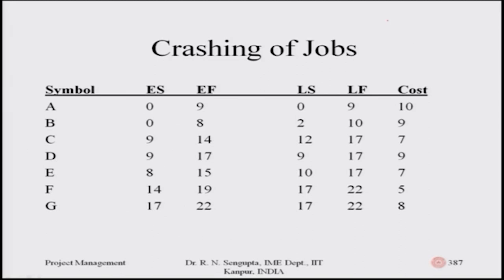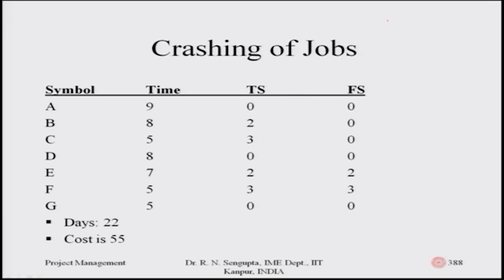Job A has an early start of zero; job B also has an early start of zero. Similarly, C, D, E, F, G have early starts of nine, nine, eight, fourteen, and seventeen respectively. The late starts for A through G are shown in the fourth column. The early finish and late finish for A are both nine, and for G they are both twenty-two — both the early finish and late finish are twenty-two.